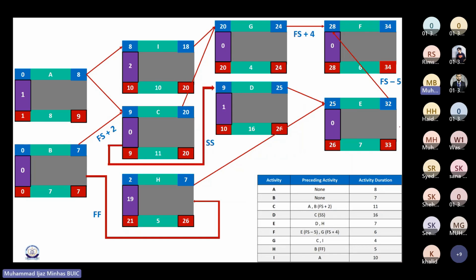Up to now, everything is clear? Clear, yes, sir. Okay, now, if I ask you, can you identify the critical path here? Yes. So which one is that? The path on which all the activities have a 0 float, right? Let me change the color. I guess 0 here, right? Yeah. So B, then C, then G. Good. G here, and then F here. That's it, not E. Correct. So this is the critical path.